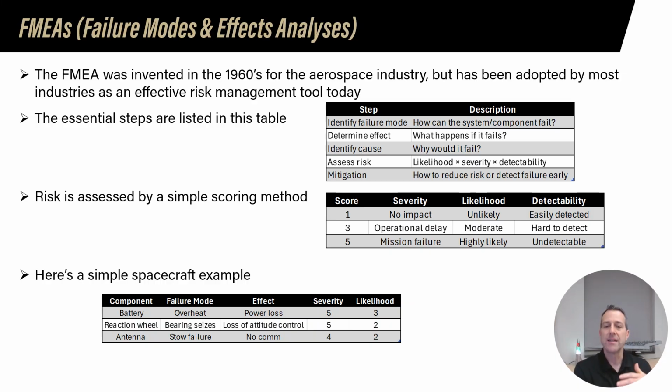It's a multiplier. And then again, a mitigation plan. What would you do? Now, in this case, the mitigation plan, I don't expect you to do a burn down plan, just in general, what could we do now to mitigate that potentiality later, okay? The severity, the likelihood, and the detectability have a 1 through 5 metric here. There are ones you can find online that have 1 through 10 and have more fidelity. Feel free to use those if you want.